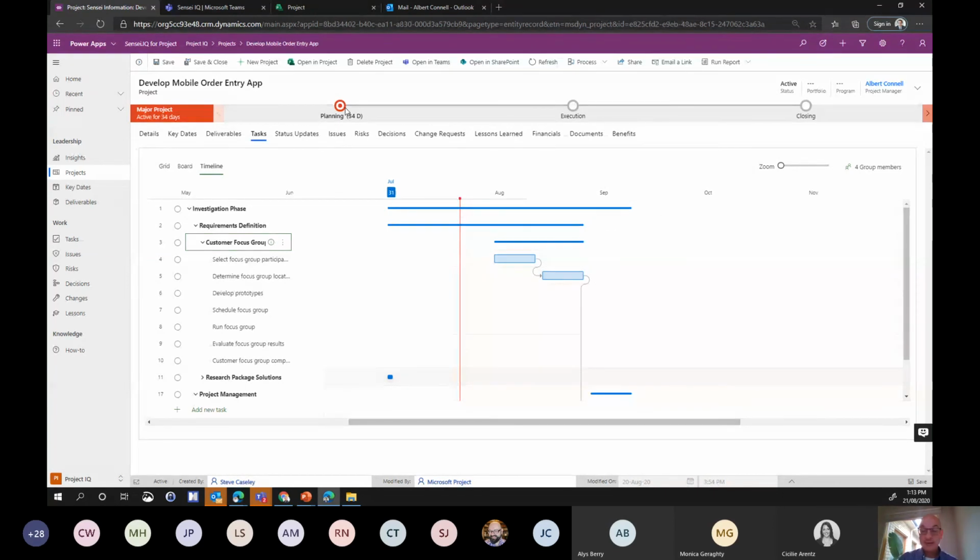Now, the answer to the question is technically yes, but we actually strongly recommend not to link the schedule into those stage gate approvals. Yes, you need to line them up, no doubt. But it quite often happens that you do want to go through a stage gate even though a previous task has not been completed 100%.